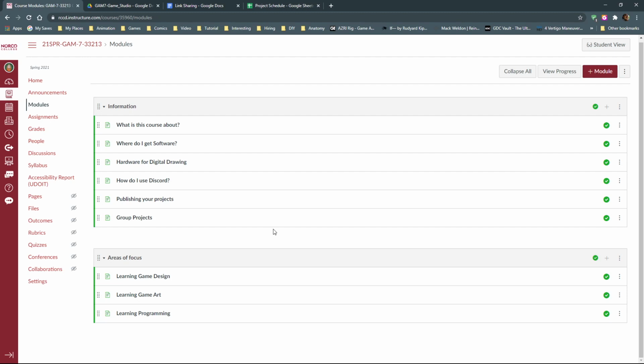If that's the way you want to set your goals, then yes. You can set your goals as large or as small as you want. You could set your goals to say, I am going to turn in a full, complete environment. And there are obviously a lot of intermediary steps to that, but we're not going to see them because you set your goal as the end result. Or you can set your goal as, I'm going to design a plausible environment that I can build, and then I'm going to build the environment, and then I'm going to decorate and texture and light the environment, and we would see three separate things at that point.